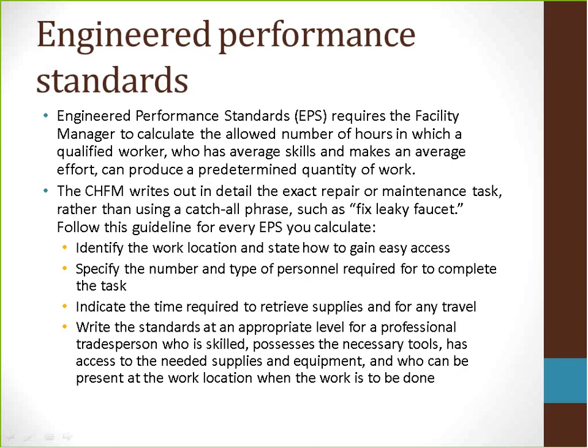Information may come from the facility manager's observations and previous experience, from the manufacturer of equipment that is to be installed or maintained, or from an experienced trained person. The CHFM must have a precise and definitive description of the work to be done before trying to calculate engineered performance standards. The CHFM writes out in detail the exact repair or maintenance task, rather than using a catch-all phrase such as 'fix a leaky faucet.' Follow this guideline for every EPS you calculate.